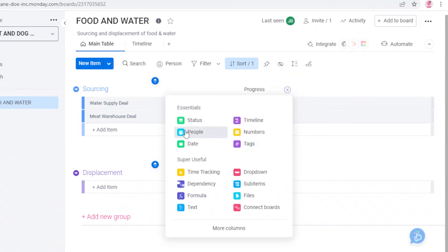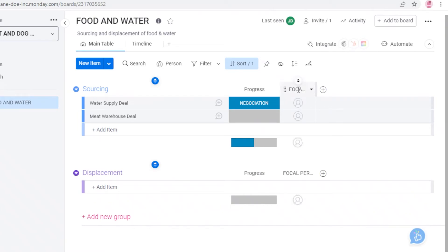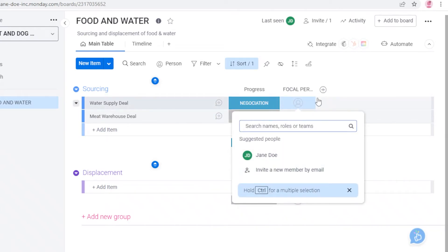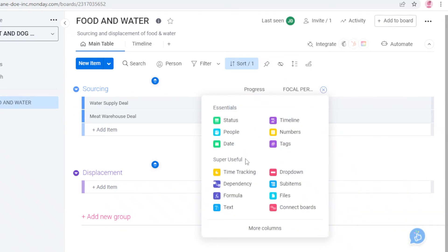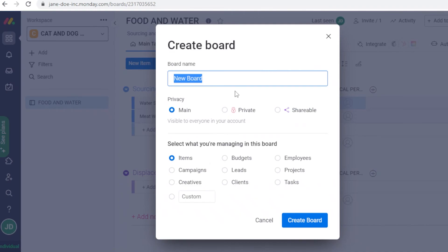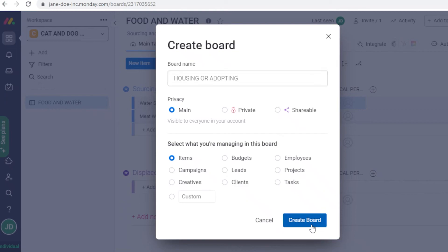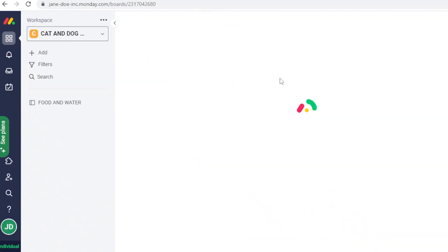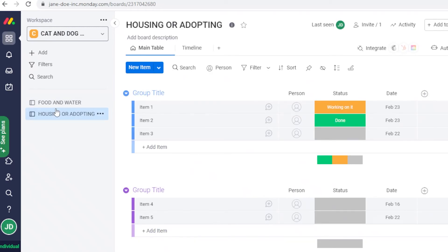Click 'Add Column' and add a People column so you can assign a focal person to each task. Then add more useful columns — such as a Date column for when the task needs to be completed, Numbers, Timelines, Dependencies, and Time Tracking. After that, you can click 'Add' and create another new board — for example, a 'Housing or Adoption' board — to manage those tasks separately.